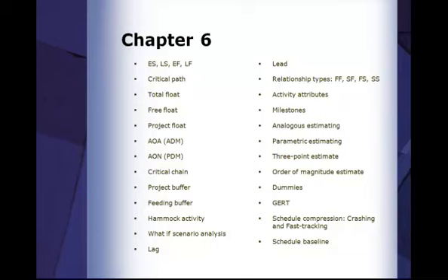AOA, activity on arrow, which is also known as arrow diagramming method, not in the PMBOK guide, but very important to know. Understand where you've got dummies. You've got dummies in ADM. You do not have dummies in PDM, which is the next one. Alright? Understand that you've got 4 relationship types in PDM, right, versus the one you've got in ADM. Understand how to calculate the critical path in both. You might not have any questions regarding the critical path calculation on your exam. It depends, but definitely good to know.